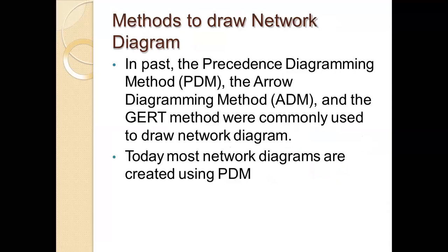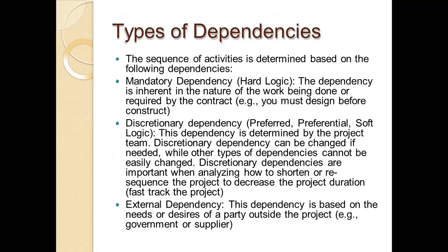Methods to draw a network diagram. In the past, the precedence diagramming method, the arrow diagramming method, and the GERT method were commonly used to draw the network diagram. These three methods were used for network diagram drawing. Today, most network diagrams are created using the precedence diagramming method.